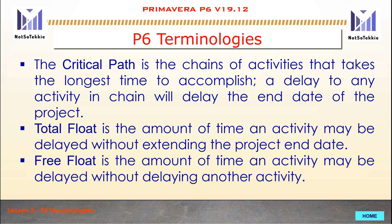The Critical Path is the chain of activities that takes the longest time to accomplish. A delay to any activity in the chain will delay the end date of the project. Total Float is the amount of time an activity may be delayed without extending the project end date. Free Float is the amount of time an activity may be delayed without delaying another activity.